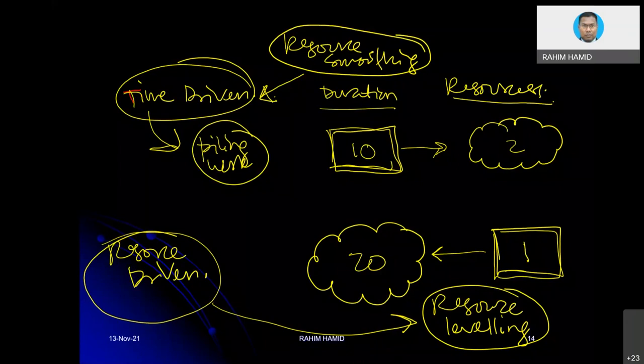Whereas for resource smoothing and resource leveling, the good thing is that we already implement those things. And there is a function in Microsoft Project that we can use with regard to resource leveling. But unfortunately, with regard to resource smoothing, there is no specific button that we can simply press and the computer will help us in that exercise. Because resource smoothing requires you to look at the overall network and then adjust those things in accordance with whatever available float in order to get the best resource utilization. So maybe because of that, the computer might not have that kind of button yet. Maybe in the future with the advance of artificial intelligence or whatnot, I'm not really sure. Maybe one day we can see those things.